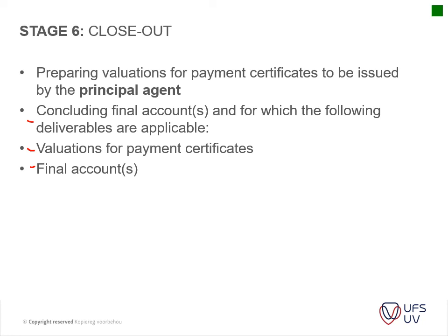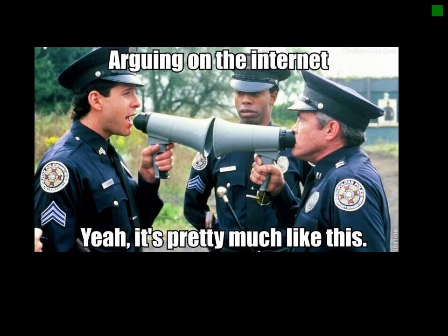There's no back and forth between him and the contractor, and negotiations and so on are usually sorted out. And then, very importantly, the final account is used by the QS whenever he does new calculations for a new project. Okay, and this is what you want to try and avoid by postponing your final account, so sort it out early on.